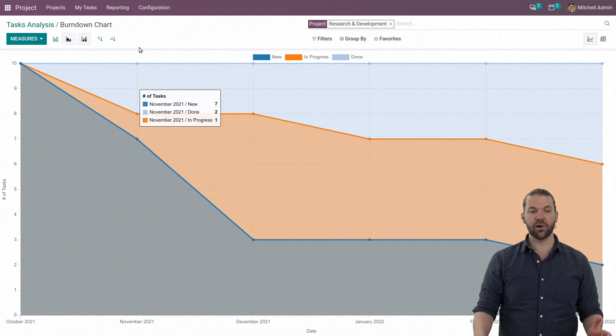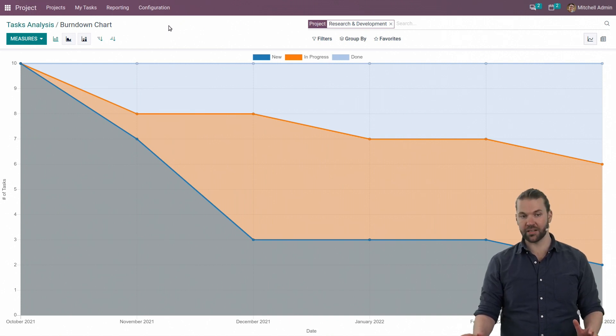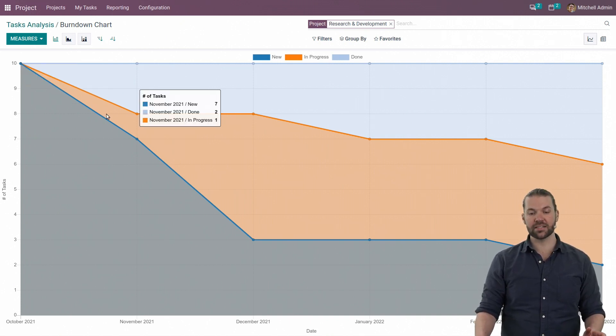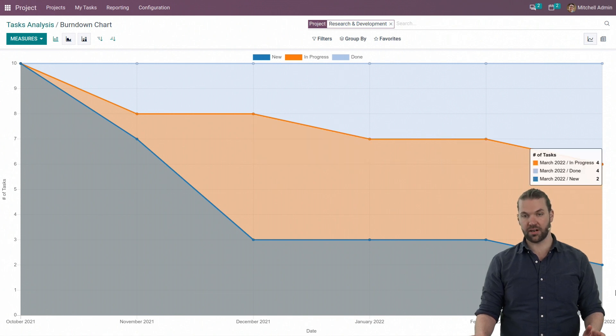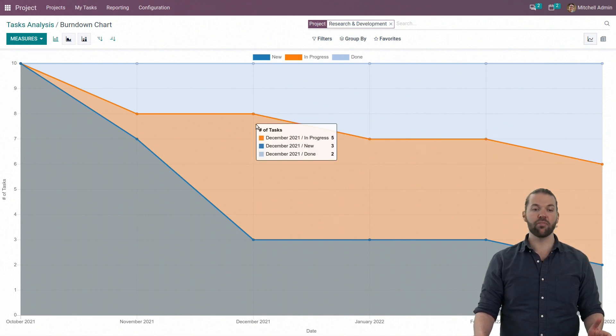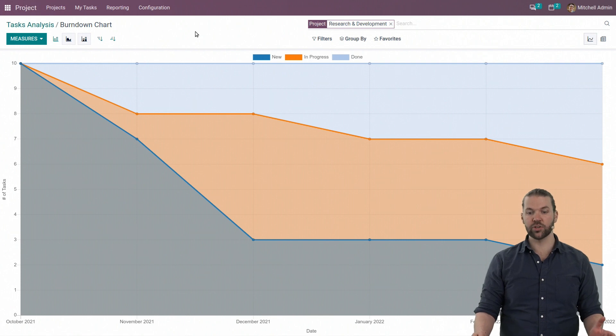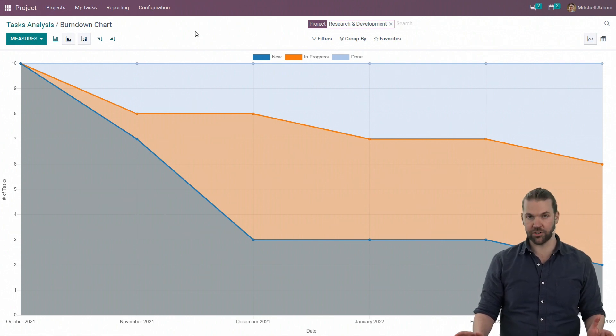So in a project that has a finite time period, something that will end at some point in time, you would like to see the tasks decrease over time. Now, if you have a project that is ongoing, of course, this will fluctuate. This gives you a good idea to see where most of our tasks are and what we need to focus all of our energy on.